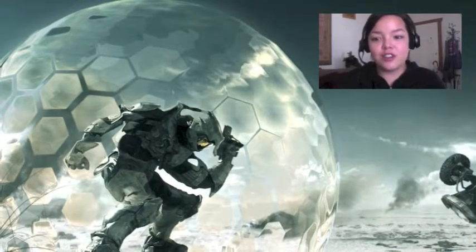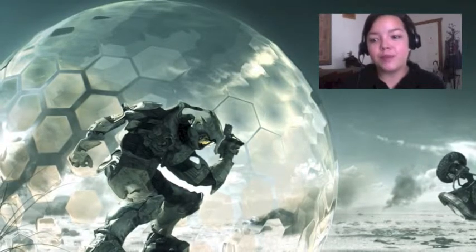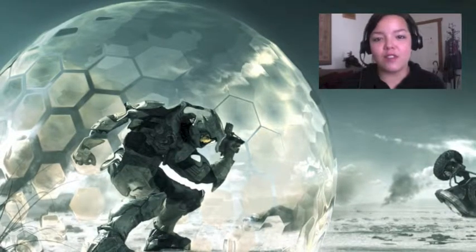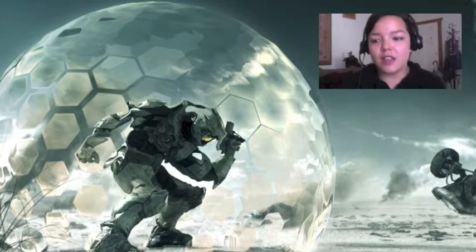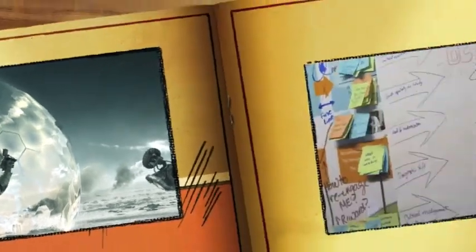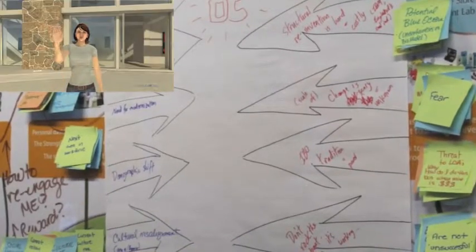The force field analysis is detailed in the following steps as it is one of the many planning tools that a team can use to facilitate change. Get a piece of paper, define an action or proposed topic, and put it in the center. On the left side, write all the driving forces with arrows pointed towards the center. On the right, do the same with all the restraining and negative forces.